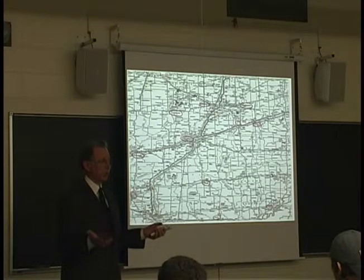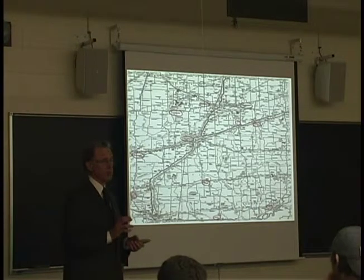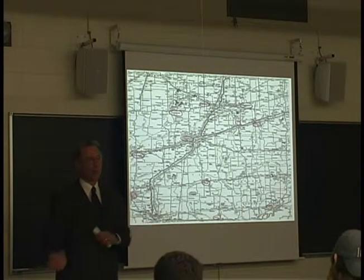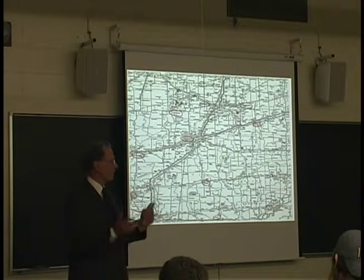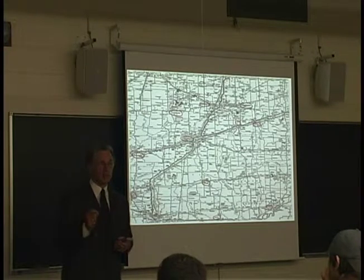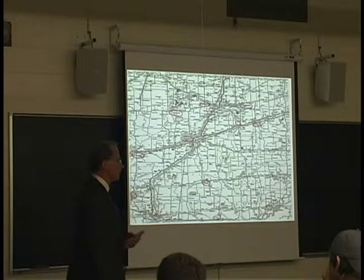In other words, we start with those basic components and you build them up, because every job is a little bit different. When you get done figuring your costs, then we of course go back and look at our history on a box culvert or on a paving project or on a bridge project. But you make a real mistake if you just try to look at averages and do everything on averages. A lot of contractors get in trouble doing those types of things.